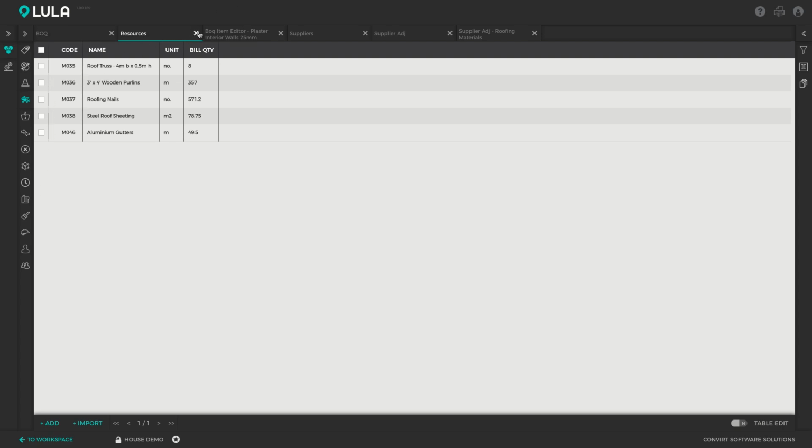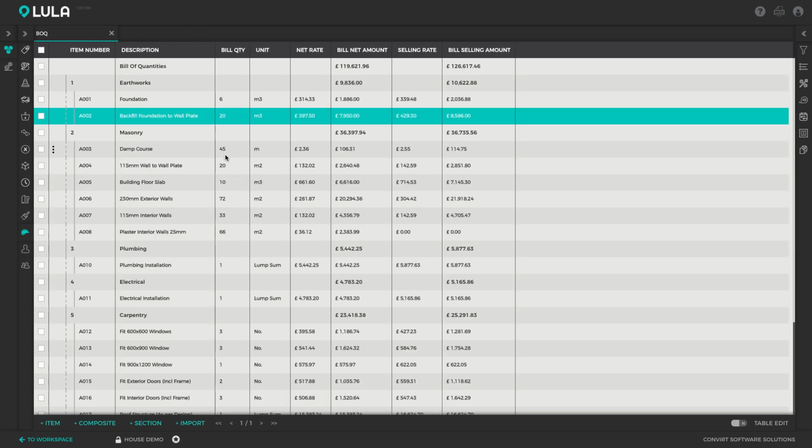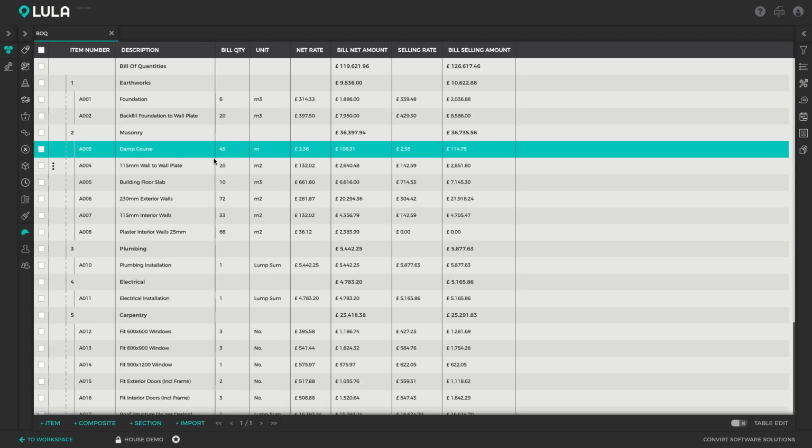We've got a similar module for subcontractors. You can define subcontractors and adjudicate certain quotes from subcontractors for certain portions of the bill of quantities that have been subcontracted. This really simplifies the lives of your estimators, and it can save them a lot of time. Once the estimators are done pricing their bill of quantities, they can export it to any of the popular planning formats.